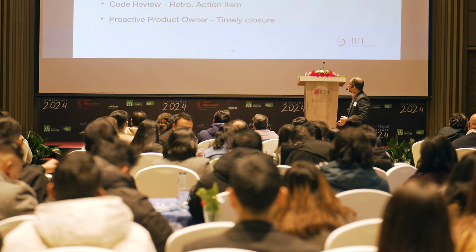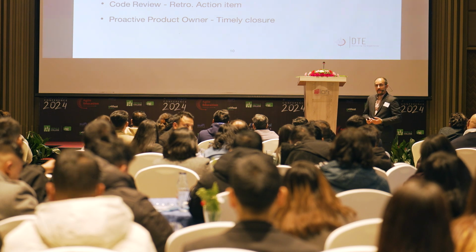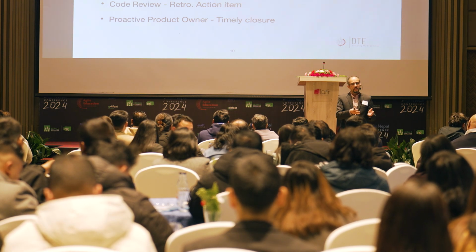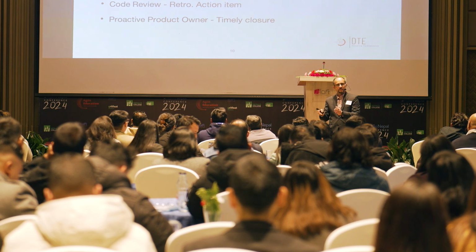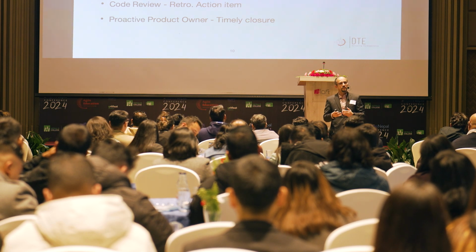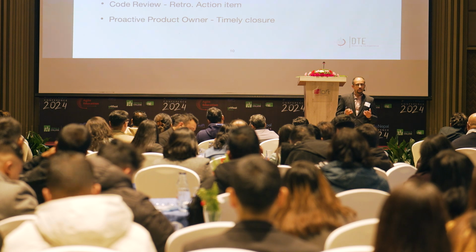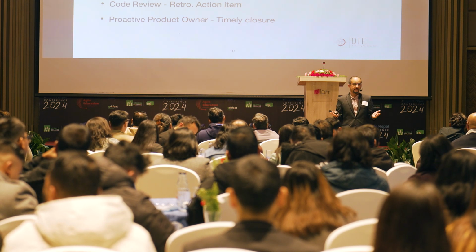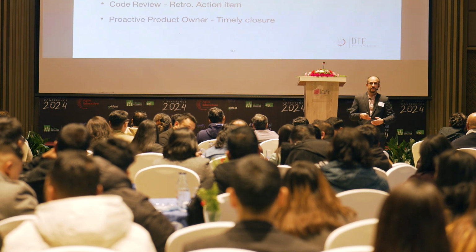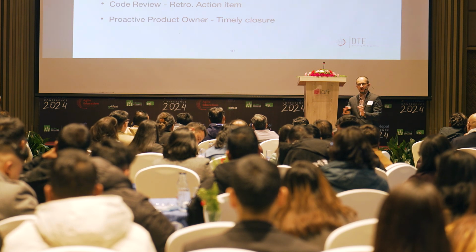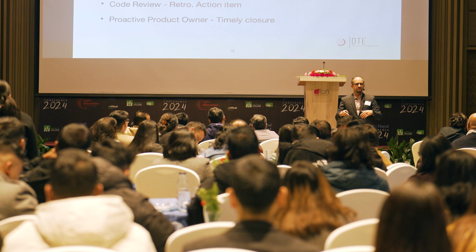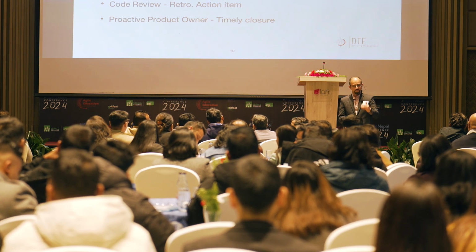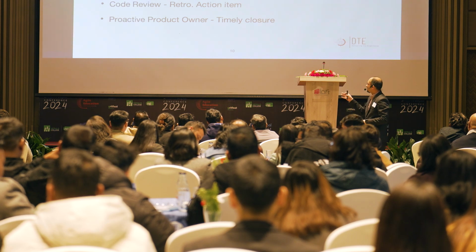But looking at what we did was retro action, story analysis. We want to make sure that between sprint planning and the start of the sprint, or maybe the first day, we have some sort of analysis done for the story so that we understand what kind of work we're going to be doing. That can be in document form, Word, just a Jira document, or an ADO comment, or a presentation, whatever you want. Leave it up to you. Be creative, or just be boring and put it in the comment section. Okay, but have some analysis.